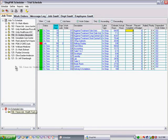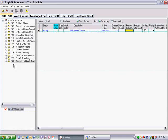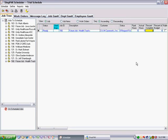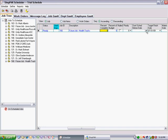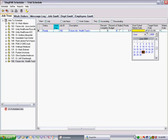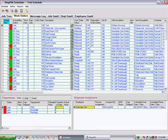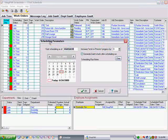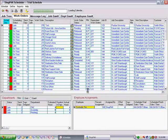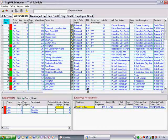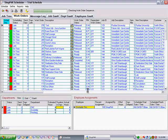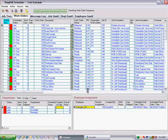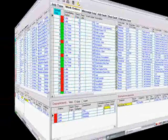Drag the job up to the Jobs to Schedule area and release the mouse button. The future job is ready to be scheduled. Since this job will hit sometime in the future, we recommend choosing a Don't Schedule Before date to push its start date out accordingly. Run the scheduler and analyze the impact on your current schedule. This will help you make an informed decision as to whether or not you should invest time estimating the job.